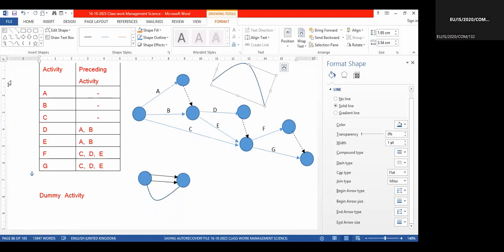We cannot bend the line; all are straight lines, all are forward movings. There is no backward moving. Backward moving means an arrow like this. If there is an arrow like this, that is a backward moving. There are no backward movements. All are forward movings. And observe that all has to end in one point.